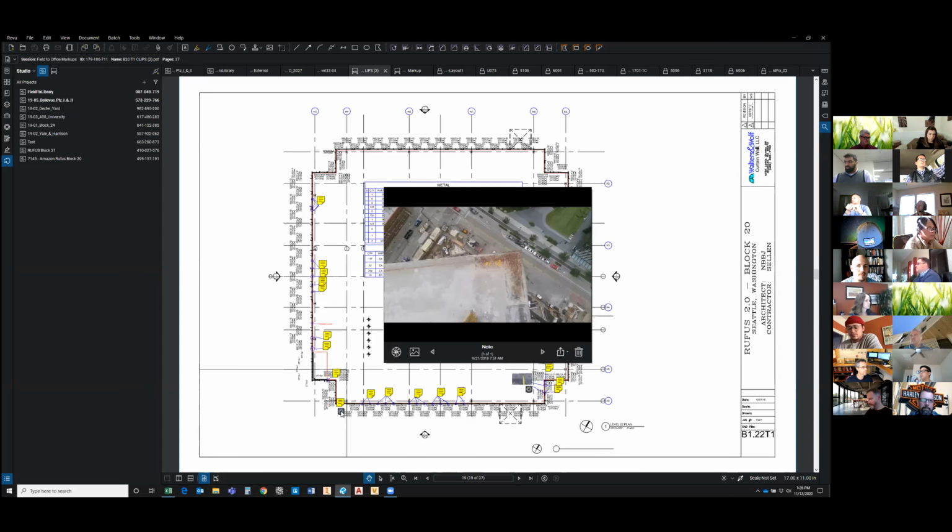So you guys don't email or anything back and forth. It's all done here. Now, this is like the central hub. Well, we don't email the issues. Usually they still have to alert that, hey, there's some bigger issue. What'll happen is usually the PMs are checking this daily, right? To see what the issue is, and then they're alerting the engineering group, hey, we have this issue.